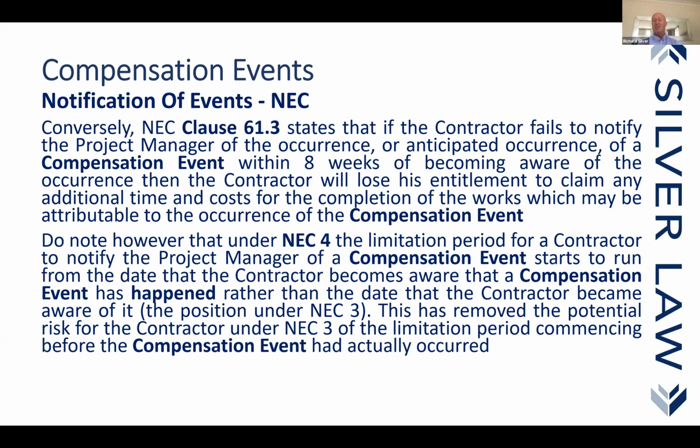And under such situation, the 8 weeks did not become relevant because it says that the 8 weeks requirement is only required to be met if the PM is not obliged to issue the event notice. And that was the exact situation we were in. So I found that they didn't fail because of this condition precedent notice, and hence they were entitled to a compensation event and all the money. Unsurprisingly, the Northern Ireland Housing Executive did not agree, and there were thereafter 2 legal cases. And I'm very pleased to say the court said I was right, and Healthy Buildings were paid, Northern Ireland Housing Executive lost, and it was held that the 8 weeks requirement to issue the notice did not apply in relation to changes to the works information.